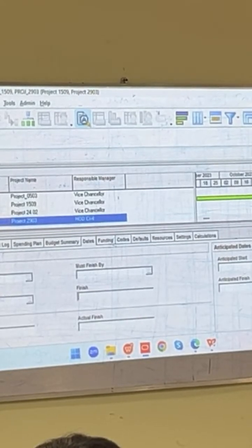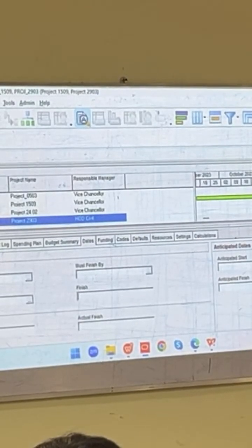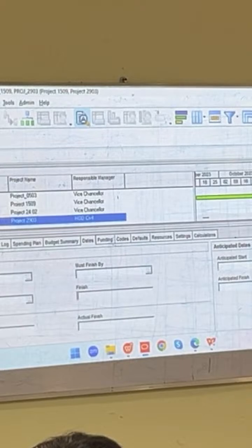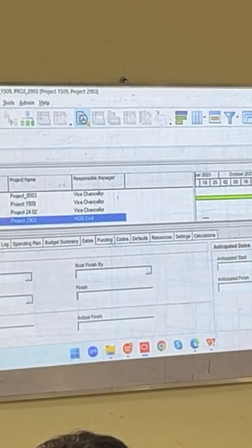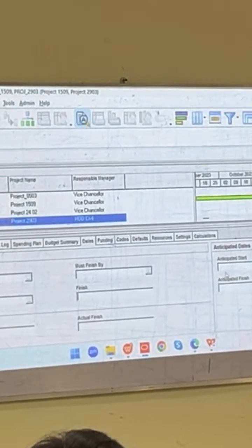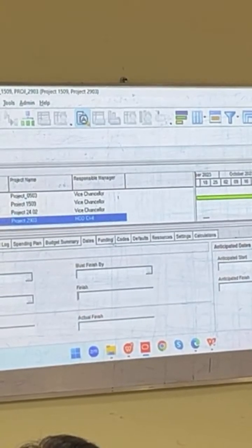General date. Data date is the date on which you have created the project on Primavera. Okay? So today we have created the project in Primavera. We may not start today, we may not start tomorrow, we may not even start next month. But data date is the date on which you have created it on Primavera. Okay? So this is the data date. If you are only going to create a plan, keep it aside.